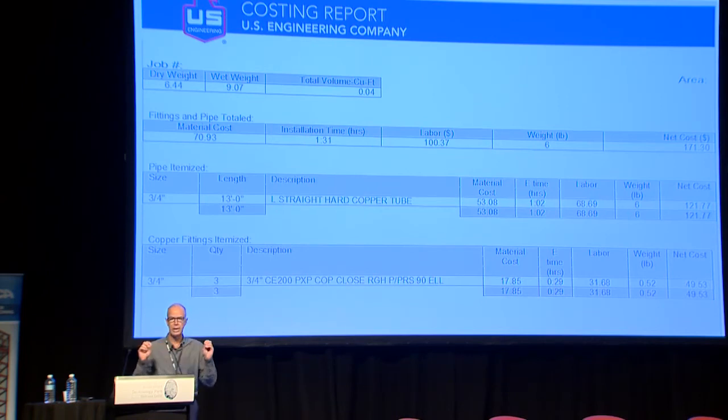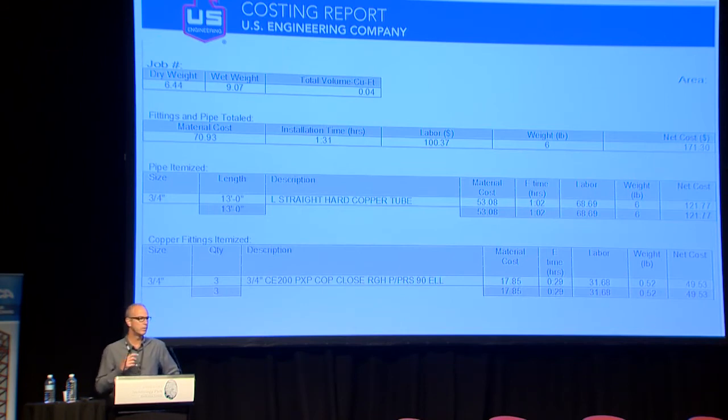One other piece of advice, if you get into creating content: you really have to think about what you're going to use that information for. When we first started doing this, we were using more generic names for the items. What would happen is we would run a report and send it to our suppliers to get price quotes, and they weren't sure what we were asking them to bid, because each manufacturer has different language, a catalog name or a model number or something. So if you're going to build content, make sure you think about the end purpose of it, because we had to go back and rename a number of things.